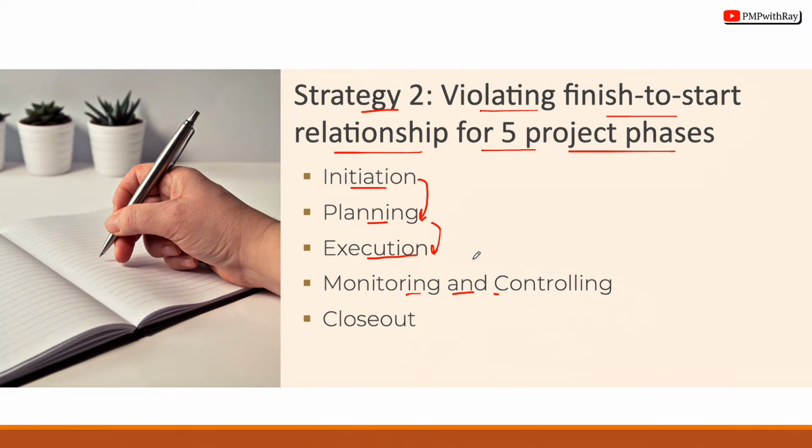So basically these two can start parallelly, but at least execution have to start a bit before you can go and monitor and control, right? Because if there is no execution, what will you monitor and control, right? And then once the execution is complete, you move on to close out. So this finish to start relationship is quite important, because sometimes the PMP exam can try to trick you